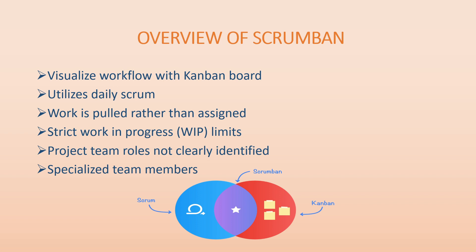Scrumban visualizes workflow with a Kanban board and utilizes daily Scrum. Work is pulled rather than assigned — as we saw in Kanban, the team member takes up work from the 'To Do' column, assigns it to themselves, and moves it to 'In Progress.' In Scrum, by contrast, the product owner assigns the work.